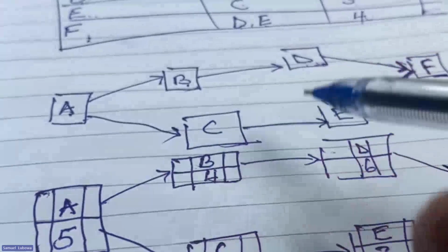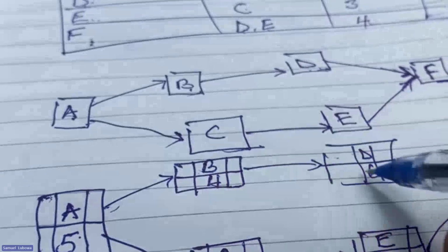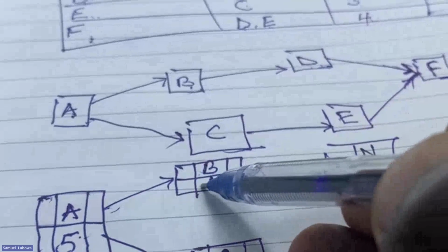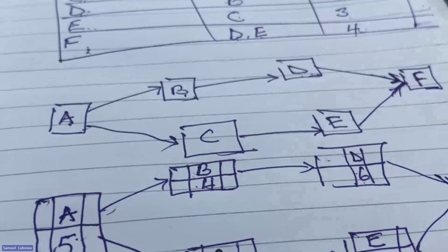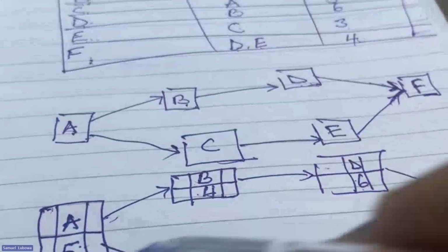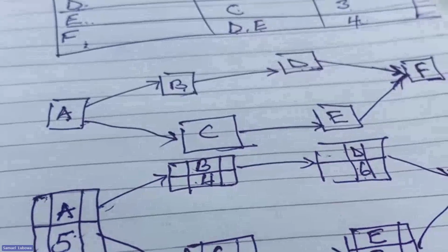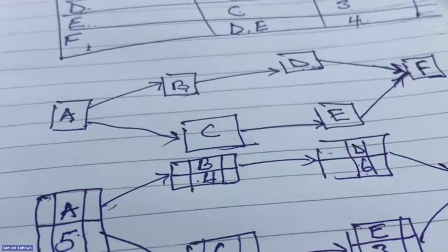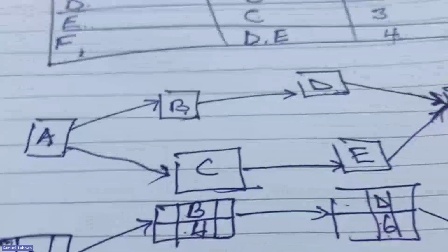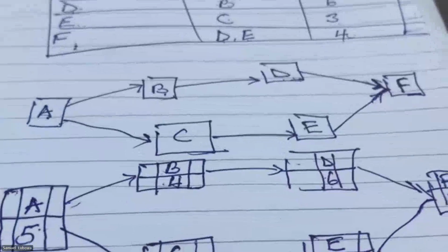The way you can see it, if you take this route, we have 5 plus 4 plus 6, 5 plus 4 is 9, plus 6 is 15, plus 4 is 19. When you take this route where we have 5 plus 5, 10, plus 3, which is 13, plus 4, which is 17. But we are going to come there, and you can also try it out.